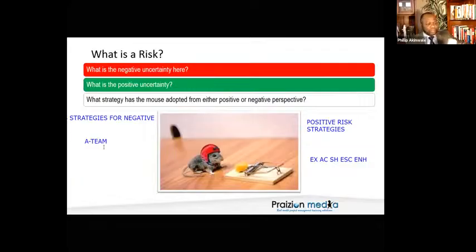If the risk happens, then we'll do this. Accept. Active accept. Here's $10. Active accept. Oh, just forget it. If it happens, it happens. We're not putting any money aside. We're not doing anything. Passive accept. So you got to be able to comfortably say, doing nothing before occurrence of a risk is accept. Doing something, like taking action to reduce the probability or impact, is mitigate.